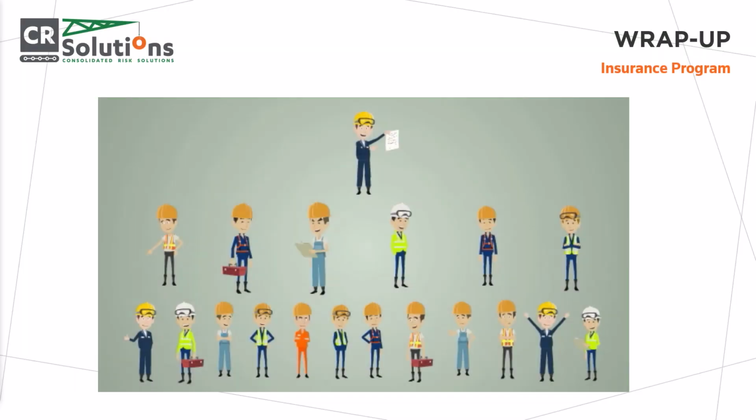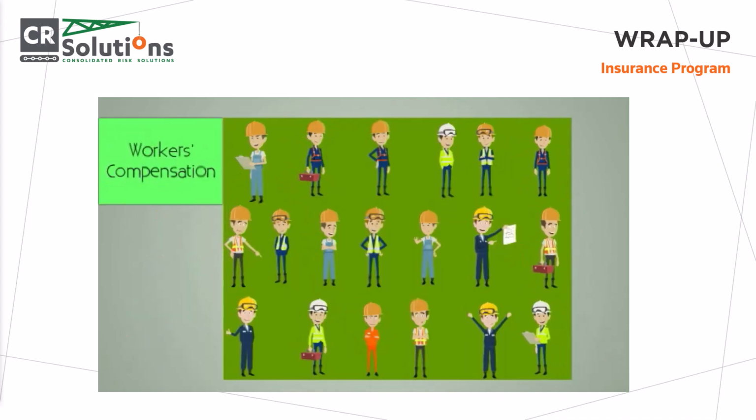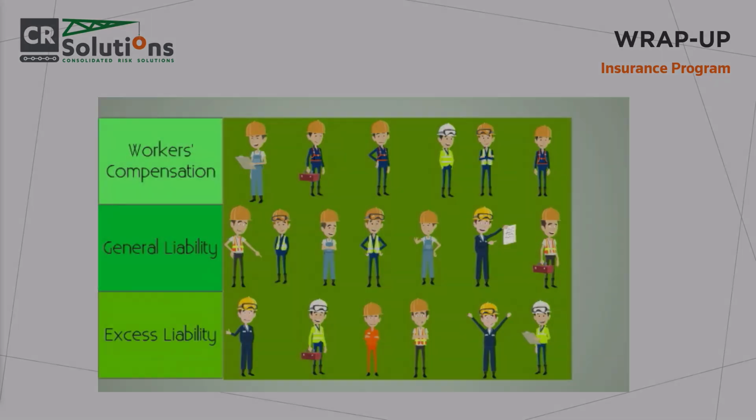To contrast the diagram we saw 2 slides earlier of the traditional approach to insurance, we have a similar diagram for a project covered under a wrap-up insurance program. As you can see, instead of hundreds of different coverages, everyone is covered under one insurance policy. Just by looking at this, you can tell that things under a wrap-up are much simpler than the traditional approach to insurance. There is no longer a guessing game about which coverages each contractor has.